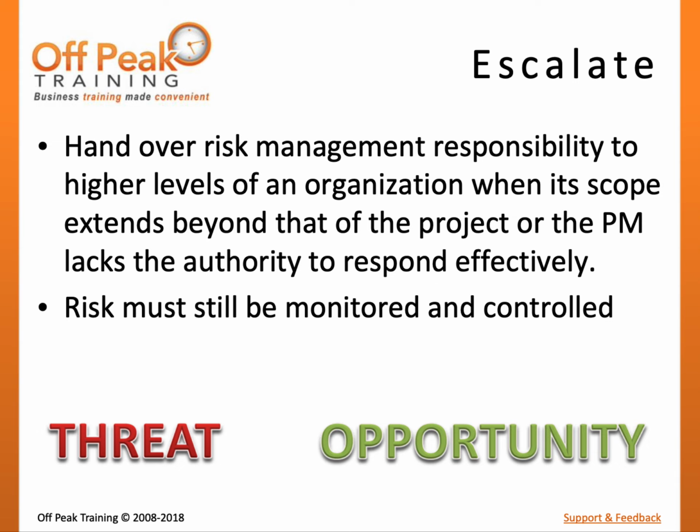Some risks may extend beyond the scope of the project. For example, a project that is part of a larger program or portfolio may share risks with other projects, and therefore it would be more efficient for the program management team to manage the risk across multiple projects. Escalate is a technique to leverage organizational resources outside of the project team to manage the risk to the project.